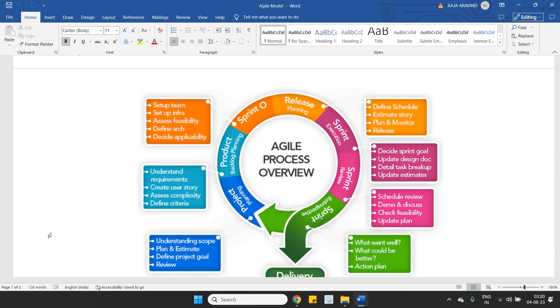For example, development time is 4 days per user story. So if they are starting on August 1st, 2023, it will be August 1st, 2nd, 3rd, 4th. If there are any Saturdays, Sundays, or weekends in the middle, those 2 days will be left out and the Monday date will be added. In that way, the estimations are set up.